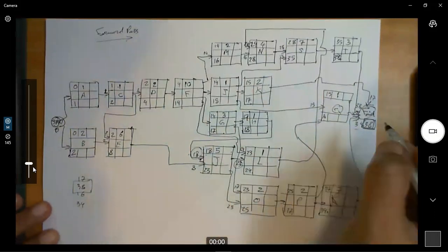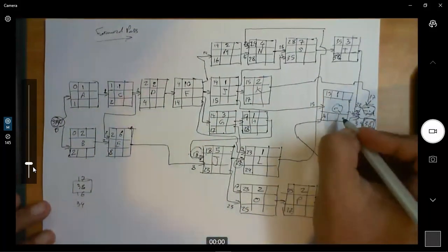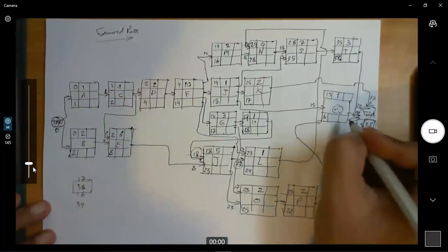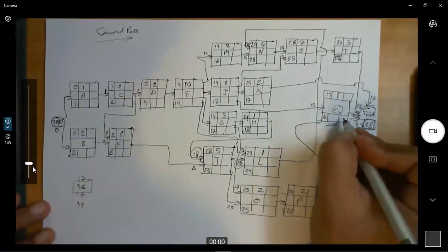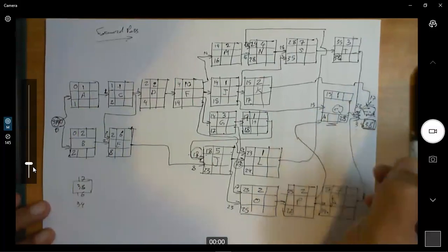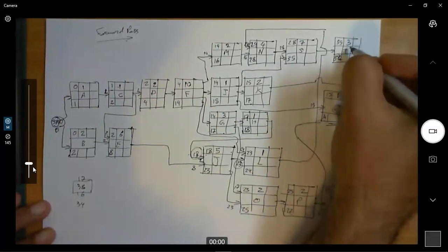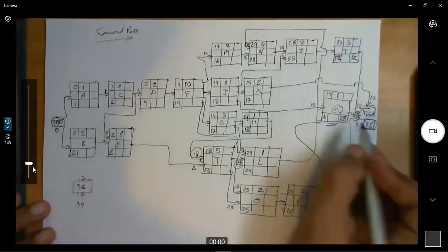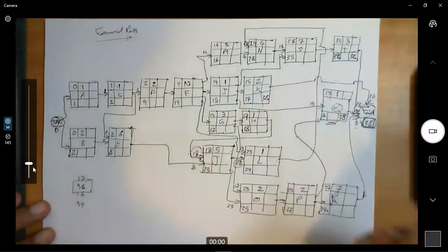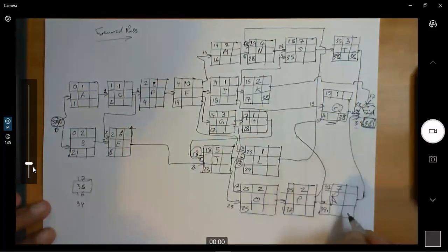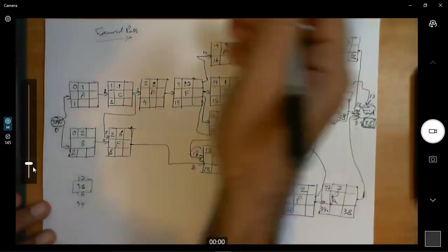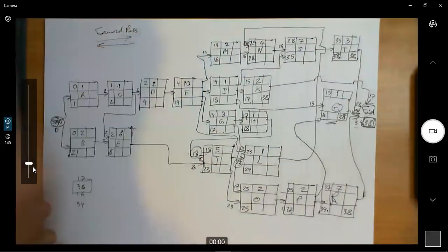So we're gonna mark the late finish for all the activities that are feeding here, which is activity Q. So here it's gonna be 38. The activity T, that's gonna be 38. Okay. And activity K, 38. Okay. Activity R, 38. So we have here 38. Yes. Then we go back again and do the backward pass.